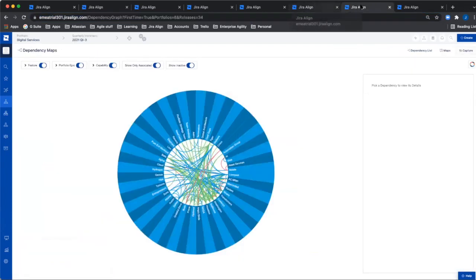And then this isn't something we touched on, but it actually plays a super important role in understanding the bottlenecks. In most organizations, and especially organizations that are looking to scale their agile practices, they need teams to work together to deliver that unit of value that the customer is looking for, right? Ideally, we want feature teams, but we also know that it's not easy getting there. But the ability to understand these dependencies between the teams, and each handover between teams is essentially a point where inventory can build up, which again means there are queues of work.